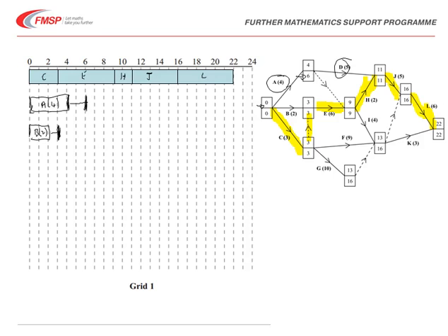D can start at 4, so D could start at this point here, it's length 5, so 1, 2, 3, 4, 5, just marking that in, and it must finish by latest time 11, so it has a float there of 2, so it could take us up to a total of 11, which is this point here.